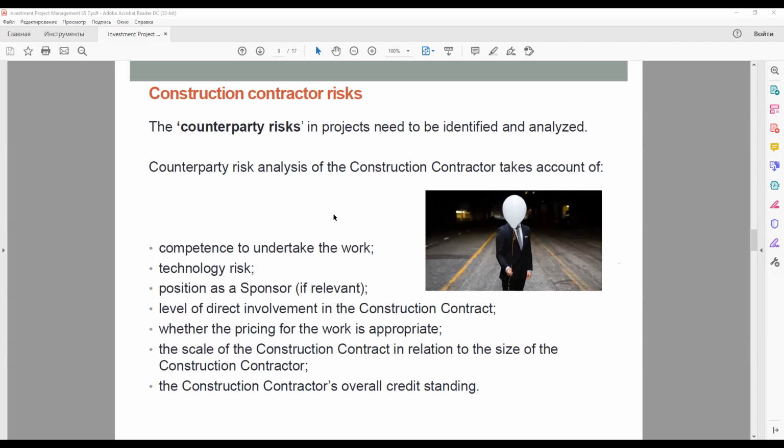This process, however, can be carried too far if the construction contractor is not a significant supplier of either equipment or civil works to the project, but just provides an envelope for a contract largely carried out by subcontractors. The construction contractor may have insufficient experienced personnel in-house and rely too much on the subcontractors.